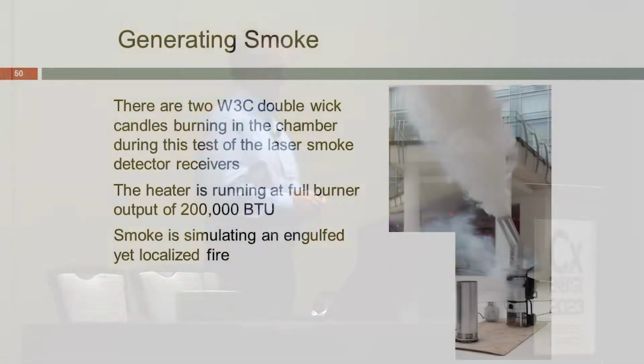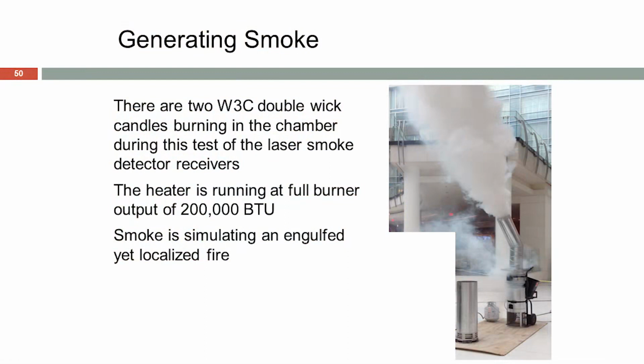So we did. We burned 2 W3C double wicks. We were underneath the laser. We have 200,000 BTUs of heat coming up off that stack at the bottom there. And the smoke is simulating an engulfed yet localized fire.